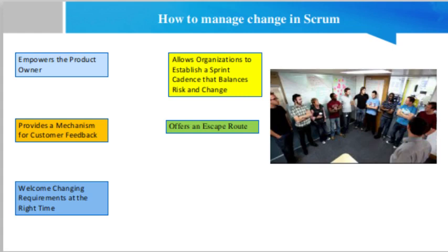If the sprint goal is no longer valid, a product owner may decide to cancel the sprint and start a new one. Only the product owner has this authority, although the development team, the Scrum Master, or stakeholders may influence the decision. When a sprint is cancelled, any completed work is reviewed. Incomplete product backlog items must be re-estimated, and if they are still valid for the product, are returned to the product backlog. A new sprint planning event is then held to kick off a new sprint. It's an incredibly costly thing to do.